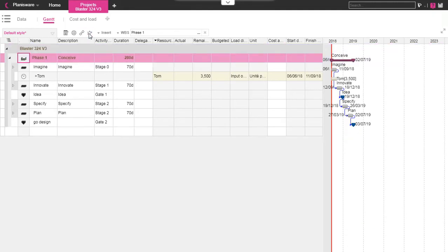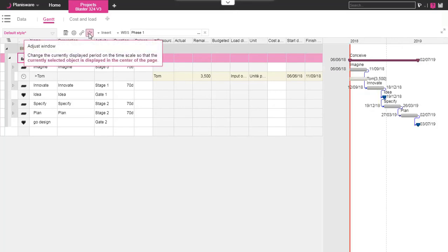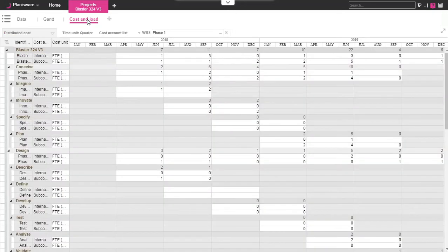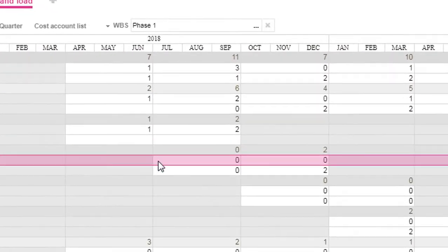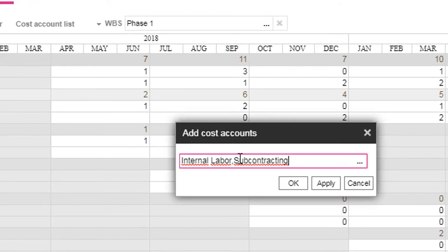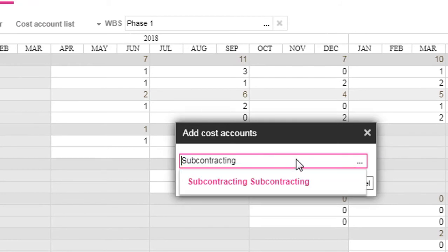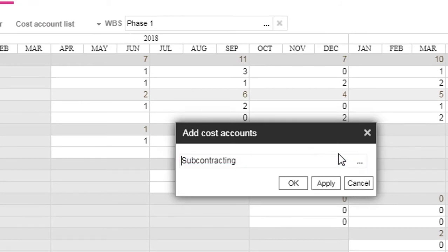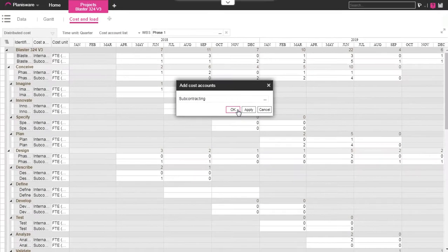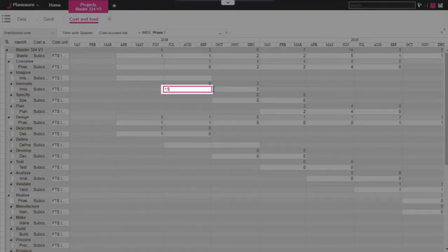After activities are planned, another way to associate load or cost over time periods is to use the load array. In this example, we select the cost line on which we want the cost, and then we enter the data directly in the authorized cells of the array corresponding to the activity planning.